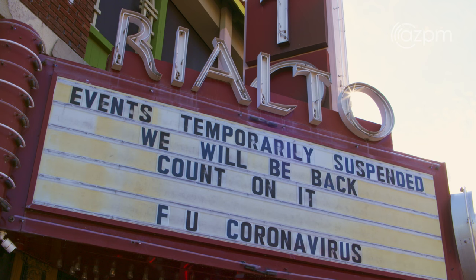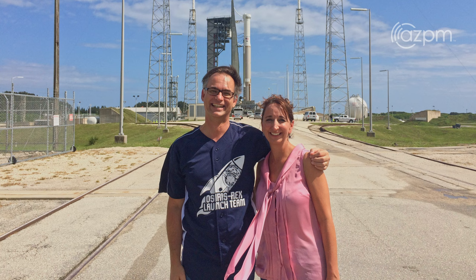Definitely everybody is concerned about the health and safety of our team members and our public and the scientific community. And the coronavirus is a unique challenge that we've never had to face before on this program, or even really for a long time as a nation. The original plan was sampling in August of 2020. We were five months away. We pushed to October because of COVID, because the team was breaking down. The stress and the intensity of the schedule... Heather, the deputy PI, pulled me aside and said, we can't keep going at this pace. Somebody's going to break down. We need to find some way to give this team some relief.